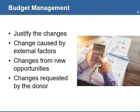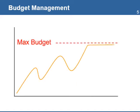For example, a reduction in the budget when a project component is no longer required. In some cases, donors may include a predefined limit by which a project may be under or over budget. The limit is usually set as a small percentage of the total budget, for example, 10%. If you find your project will be above the predefined limit, you will need to take corrective actions to bring the budget back on track.